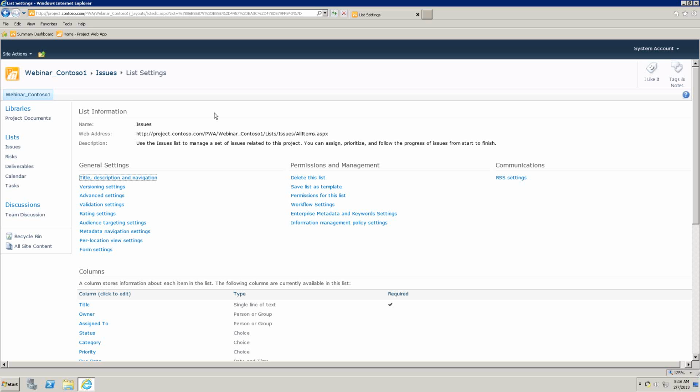Okay, you might get away with changing the name. I haven't tried that, but you don't want to, for example, change the column type of any of your existing columns, and you certainly don't want to delete them. And in a moment, we're going to show you how to hide things without deleting them. I can't tell you specifically on renaming a column. I haven't done that. Actually, I have done it once and I didn't have a failure, but that doesn't mean that we wouldn't have a failure. The general guidance from Microsoft is don't mess with the built-in stuff. Don't delete anything, and don't change column types. Best I can tell you on that right now.